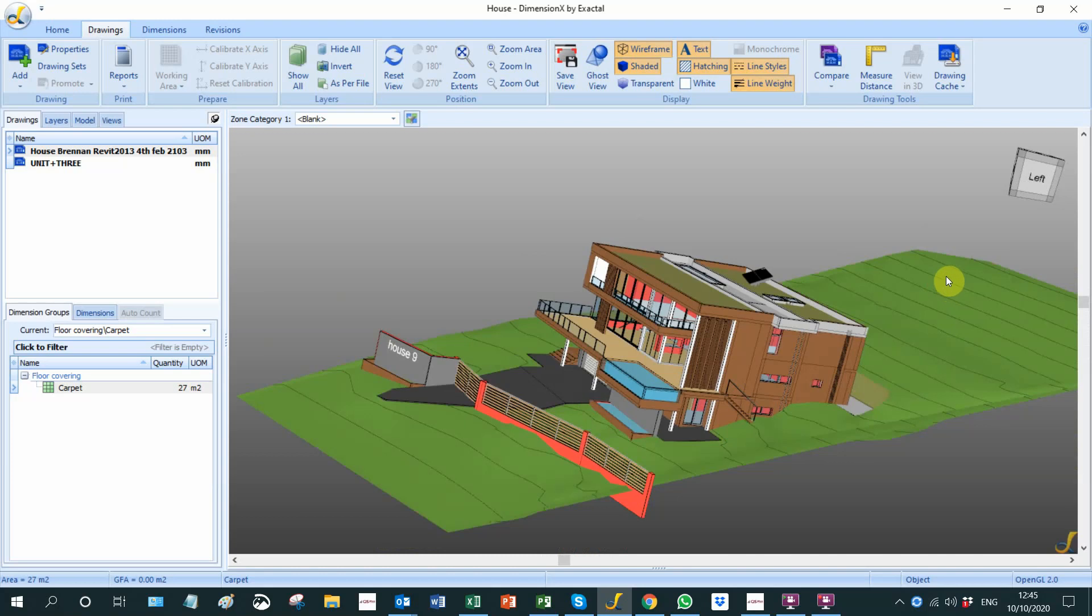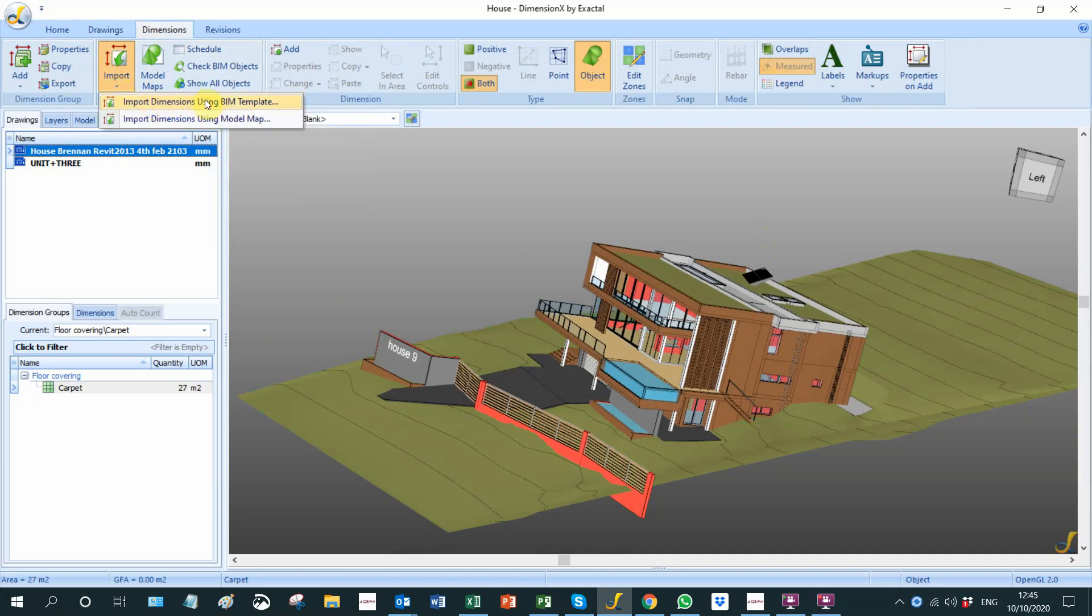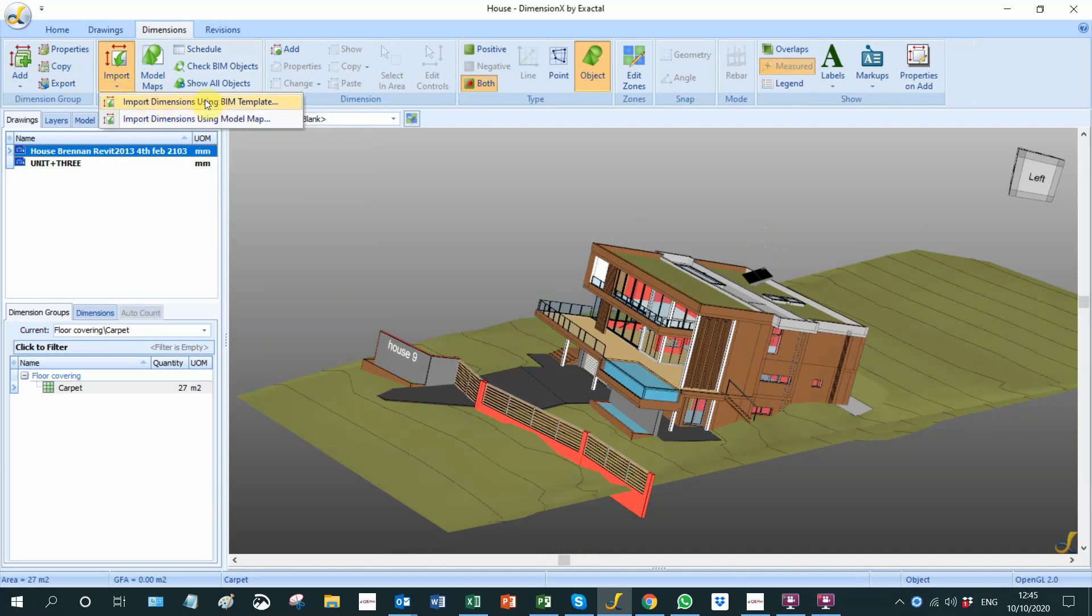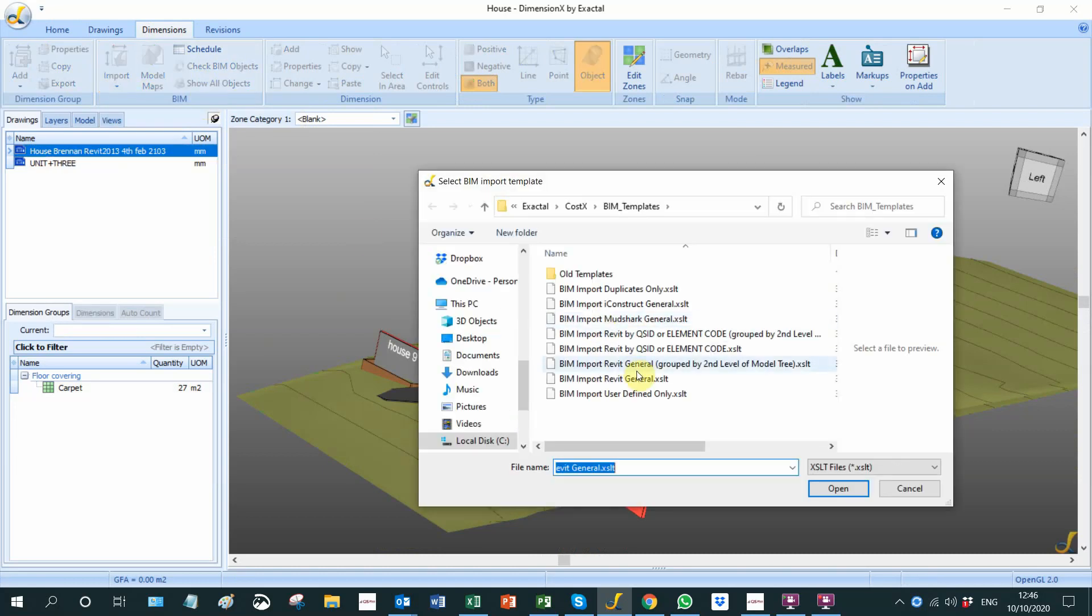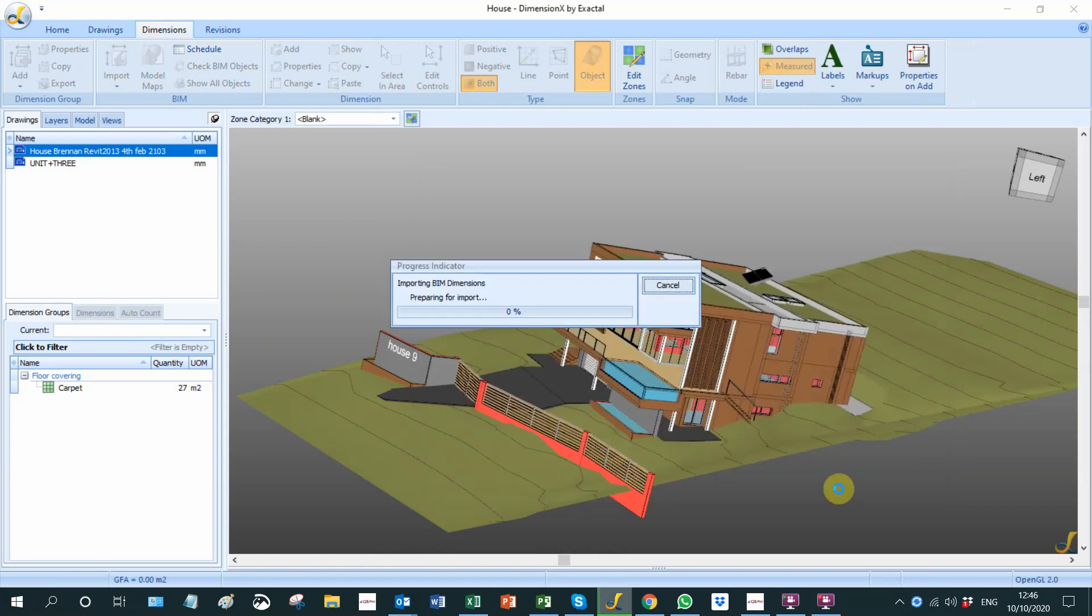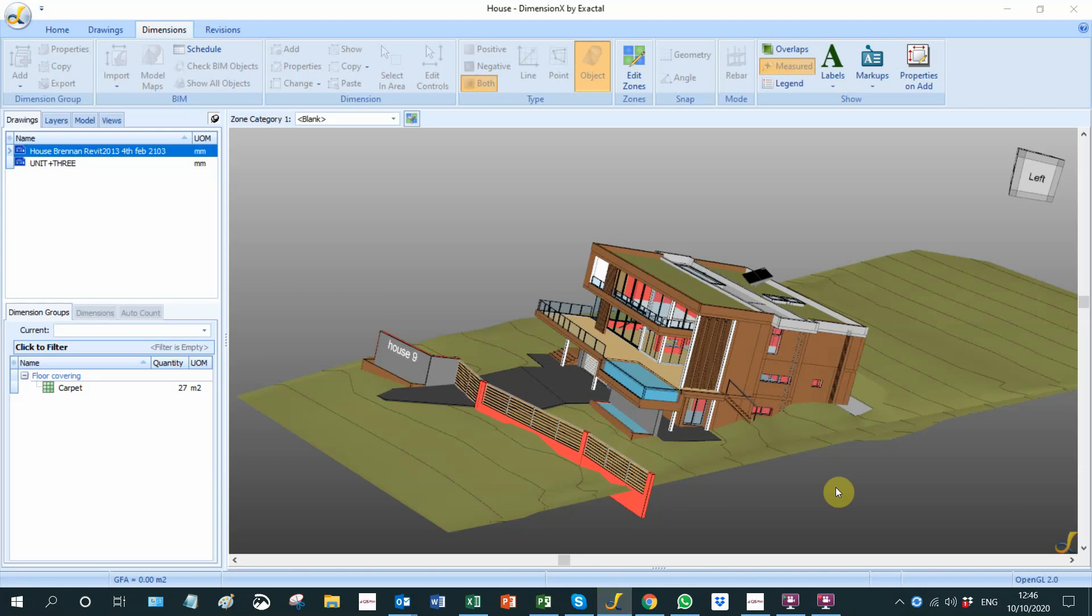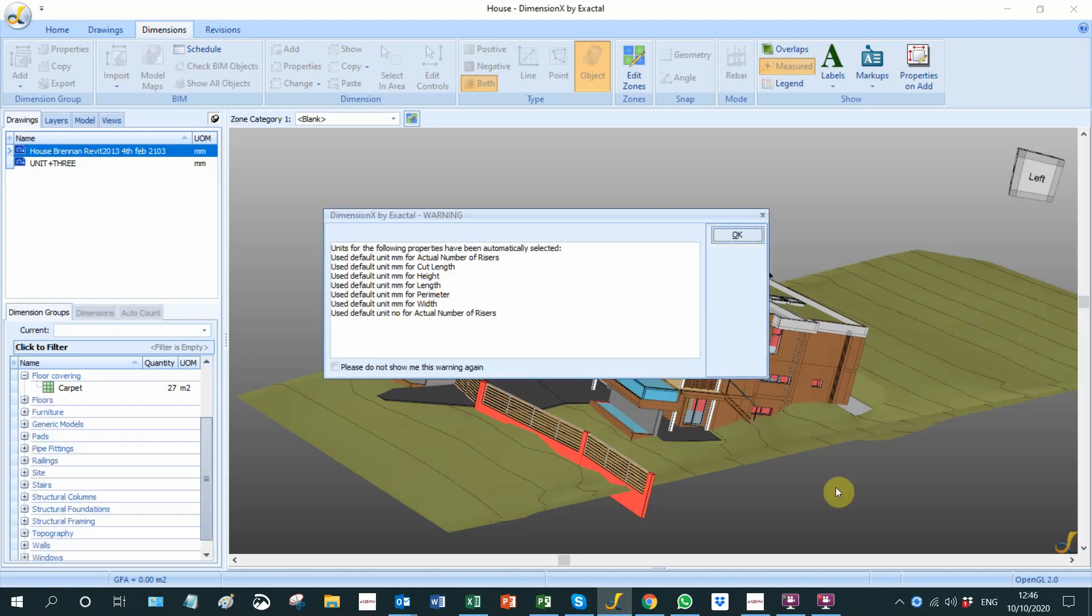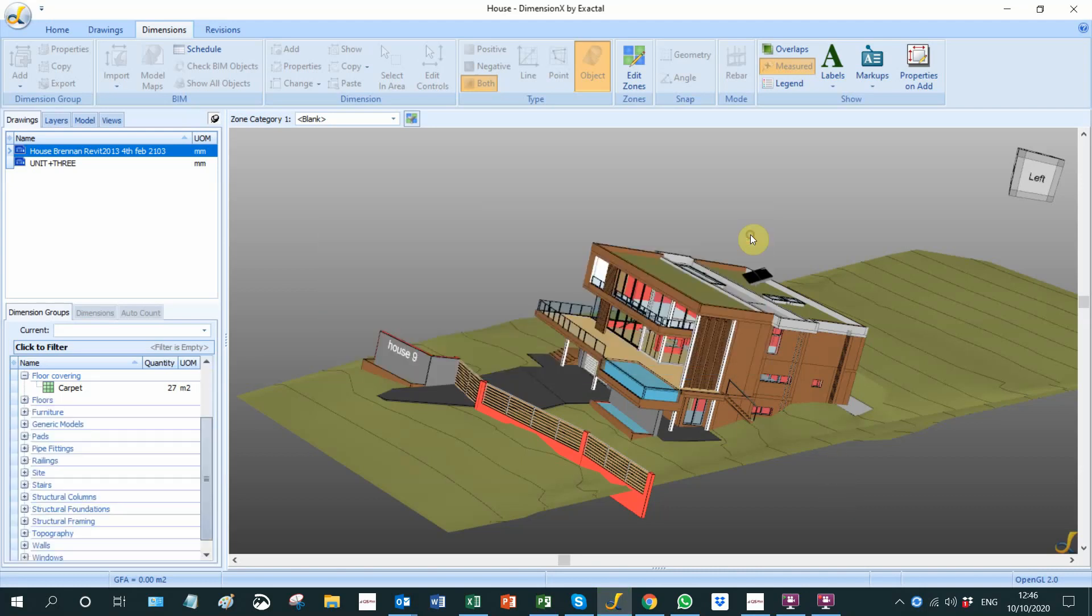I will show you now how we take off the quantity. We will go to dimensions, go to the import button, and import dimensions using BIM template. The template we're going to use is the Revit general. I open that and there it is, measuring that entire job in a matter of seconds, unpacking all the models in there with their quantities.